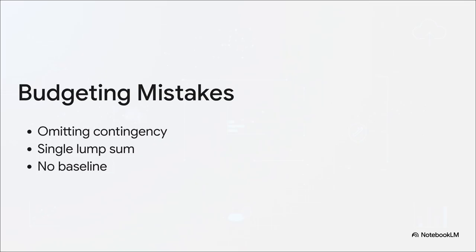Let's talk about red flags, though. A massive budgeting mistake is treating your project budget like one giant lump sum, instead of a WBS-aligned cost structure broken out by category. Please don't forget your contingency reserves or those indirect costs like administrative overhead. And frankly, if you don't baseline this exact setup, trying to track cost variances later is basically meaningless.